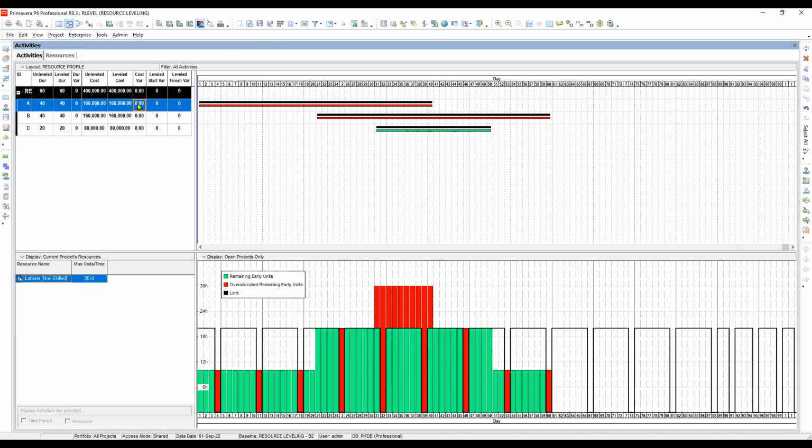If you find out that the current allocation, the reason why it is over allocated, is that the original calculation was not done accurately, then that is the right way of reallocating the project for over allocation.